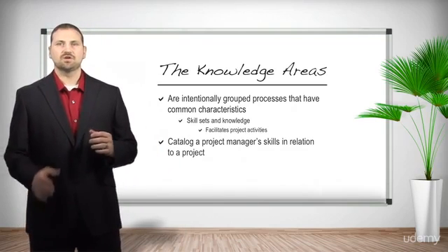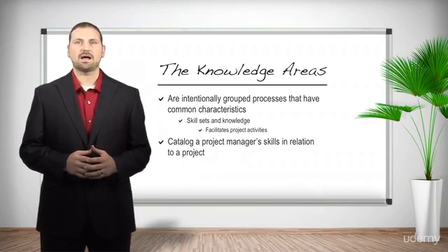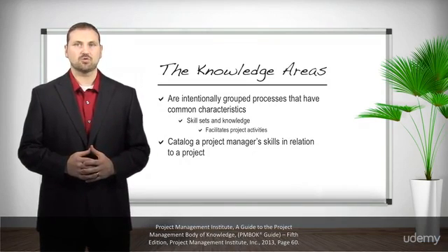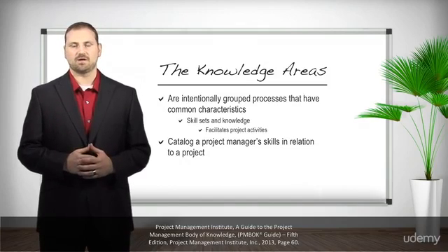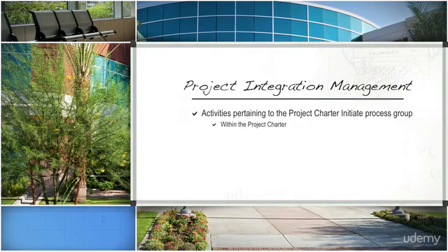So let me give you an example. To initiate a project and ensure that all respective details are accurately captured to get things started, you would begin with the initiate process group and the integration knowledge area. The first process that you'll encounter details activities pertaining to the project charter. The process itself is called Develop Project Charter, and it provides details pertaining to inputs, tools, and techniques, and outputs of the process itself, which is the case in the project charter.